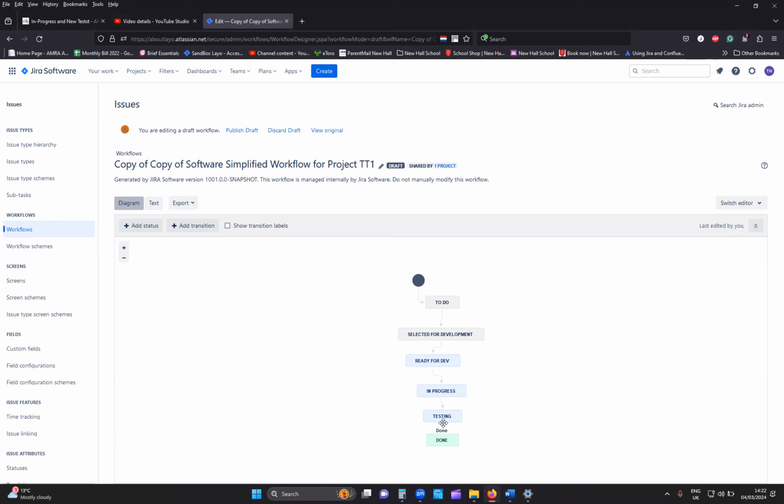Remember that in Jira, even though the statuses are showing as done, if you do not set your resolution to done as well, Jira doesn't recognize that ticket as a done ticket, okay? So it's always very important that you do have a resolution screen on your workflow. And then second, make sure that whenever you're using the statuses and you've moved to done, you always need to remember to set your resolution as well to done, or whatever the situation might be.